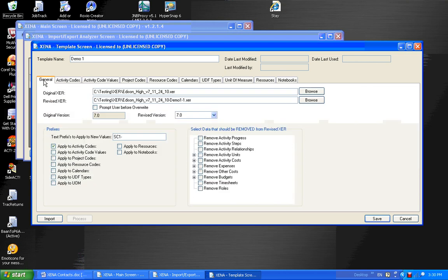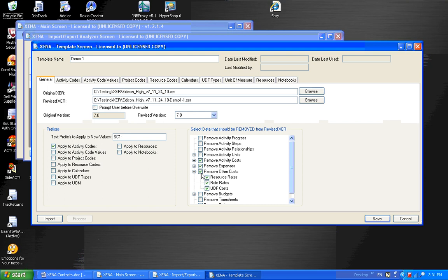Next, besides manipulating the activity codes and project codes, we can also remove information out of the XER file. Sensitive information such as costs or expenses. We do that by using this grouping over here. And we could remove activity progress, activity steps. We could remove the costs. And we could remove expenses. And we could remove other costs too. And underneath these, with the plus, there are subsections. So I could have just removed resource rates. And on expenses, I could have just removed planned expenses. So this gives the person or the group building the XER file the ability to remove that sensitive information before that XER file is then given to one of their partner companies.